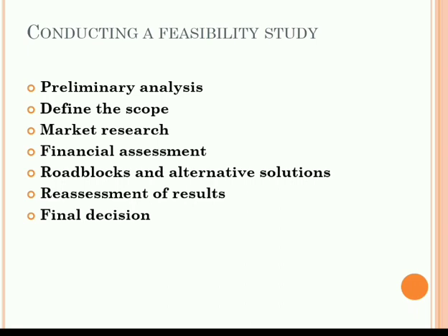The purpose of project identification is to develop a preliminary proposal for the most appropriate set of interventions and courses of action within a specific time and budget frame to address a specific development goal in a particular region or setting. Here, we have to select information on project options that must be gathered to enable a government and financial agencies to select a priority project and reach agreements among stakeholders on arrangements for preparation of the work.